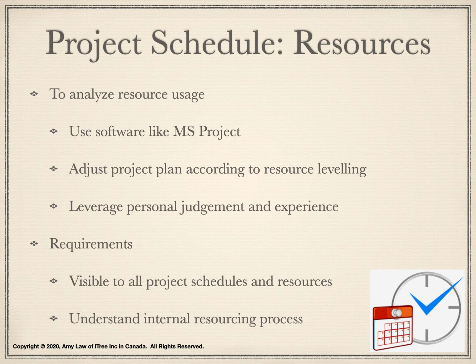Project schedule can help us to analyze resource usage. We can use software like Microsoft Project to examine resource allocations. We can adjust project plan according to resource leveling. The objective of resource leveling is to structure activities in a project to optimize the resource usage so that none of the activities are blocked by a lack of resources. The resource analysis heavily relies on personal judgment and experience.